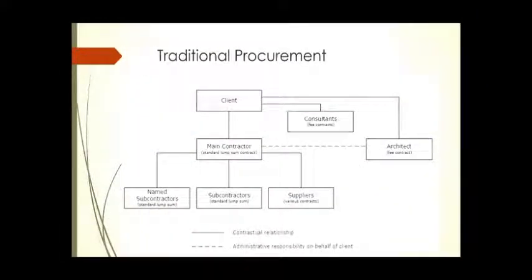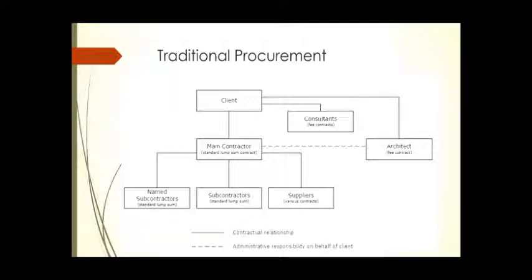Under the traditional procurement route, the client has a contractual relationship with the main contractor, and also a contractual relationship with the consultant. The architect is the one administering the contract and doing supervision. The consultant could be a cost consultant or anything, but the client could also have one consultant — the architect — doing design, supervision, and everything for the employer.